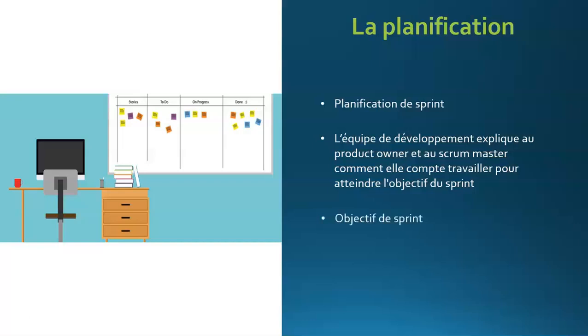They review and evaluate what needs to be delivered, what tasks need to be done, what the priorities and goals are, and what they are trying to achieve in this sprint. In theory, you can spend up to 8 hours for a month-long sprint. But in reality, Scrum teams, after having done it 2 or 3 times, usually spend less than an hour planning their next sprint because they already know what they are going to work on.